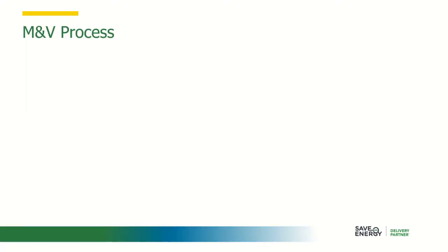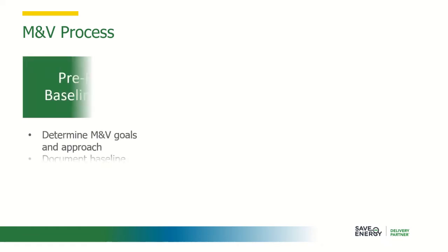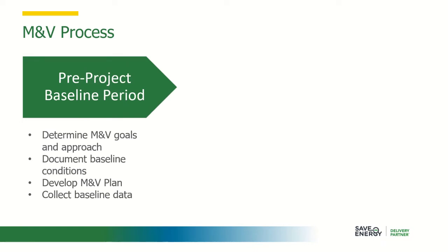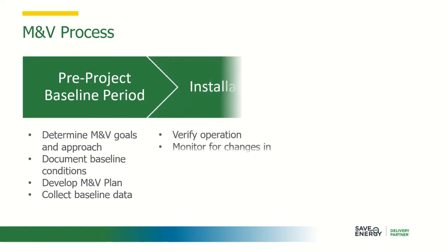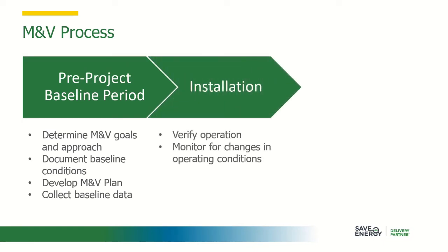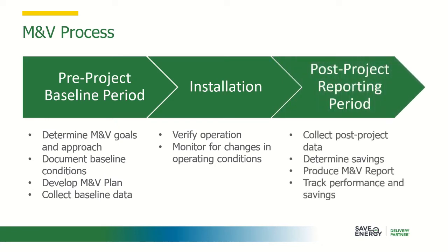The measurement and verification process begins well before a project is implemented and should start in conjunction with project planning. It involves developing an M&V plan that will define key activities, including how data will be collected in the baseline and reporting periods. An M&V report will summarize activities that were conducted, including a clear presentation of verified savings relative to estimates. Ongoing efforts will help ensure these savings persist year after year.